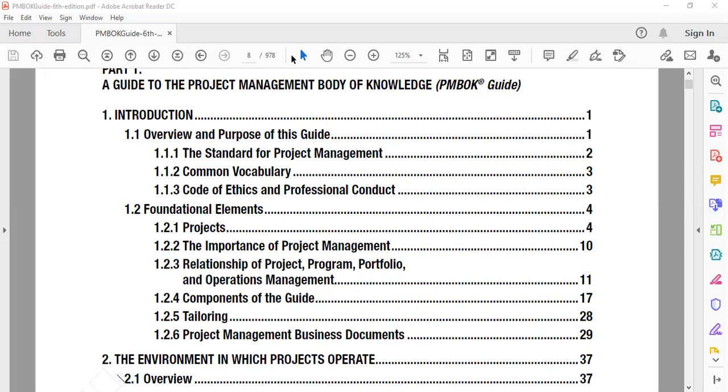In financial benefits, we check the net present value of the amount to be invested, the return on investment, payback period, and benefit to cost ratio. And the final conclusion was that we would select a project with the least payback period and highest financial return. That's the end of chapter number one.